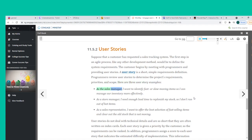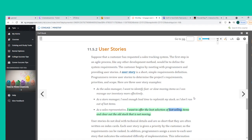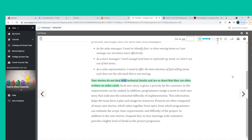Three user story examples: As the sales manager, I want to identify fast or slow-moving items so I can manage our inventory more effectively. As a store manager, I need enough lead time to replenish my stock so I don't run out of hot items. As a sales representative, I want to offer the best selection of fast-selling items and clear out the old stock that is not moving. User stories are often written on index cards.